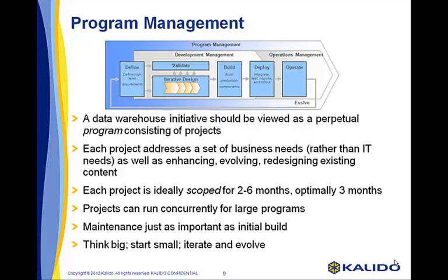The program drives the prioritization of business requests, and a project is instantiated for a particular set of business requests. There are 2 key points here. First, each project is always focused on solving a set of business problems, not technical problems. Second, the project needs to be driven by time rather than scope.